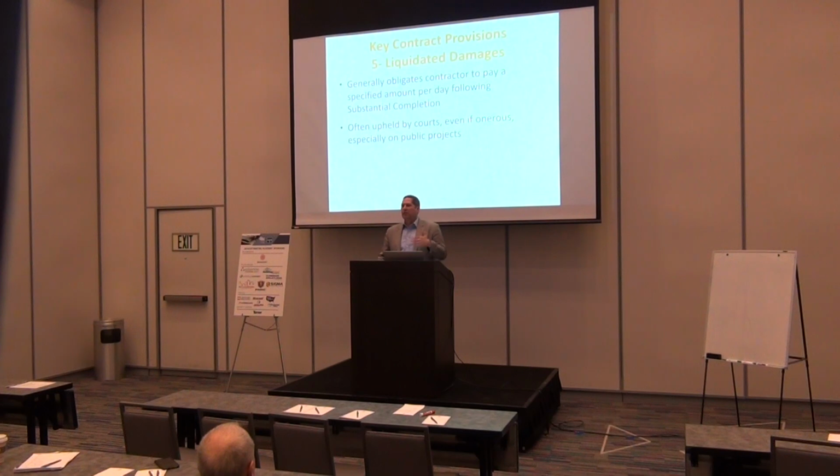The whole point of liquidated damages is to quantify what the owner's damages are going to be if the project isn't completed on time. But if the owner wasn't going to move in, wasn't going to utilize it, and kind of a no harm, no foul, you can argue that a little bit, although my perception has been, the judges don't like to hear those arguments. They'll just enforce it, but it's at least something that you can try and negotiate on the front end, which is what I would recommend. So, right, any questions on liquidated damages?